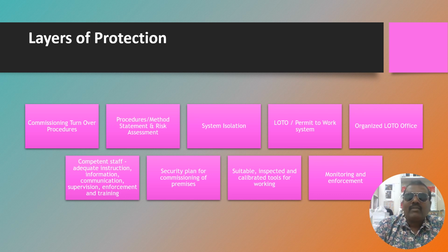Okay, so after that heat run test, what might happen? It's ready for the operational condition of the site. So that system will be handed over to the commissioning operation department so that they will be running this motor or pump according to the suitable requirement of the project. That means maybe it needs some preservations or whatever, they will be starting the motor. So this is an example for a motor.